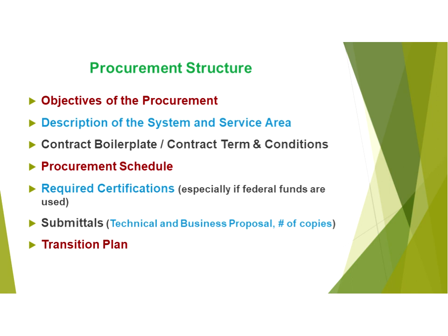So addendum 1 would likely be 2 weeks after receiving questions, because not only do you need to answer the questions, you often need to vet them within your agency. The due date for proposals, my preference is 3 weeks after issuance of the final, certainly after issuance of the first addendum. If there's more than one addendum, you may have to postpone it. The award and notice to proceed, anticipated date, depending on your agency's approval level and procedures, could be 3 to 6 weeks after receiving the proposals.